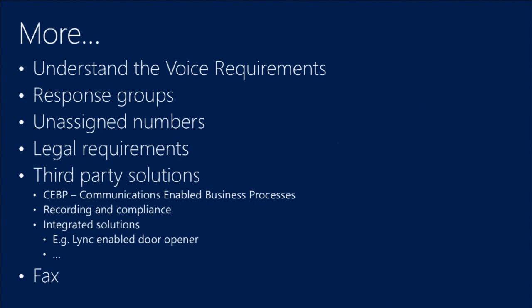Do they need response groups? What do we do about unassigned numbers? Are there any legal requirements? So far we spoke about emergency calling, but there might be legal requirements for compliance and for recording. Link, out of the box, doesn't do any recording of calls. Yes, you can do client-side recording, but depending on what vertical you're in and what country you're in, you might have to record all the calls with certain customers. There are a lot of third-party solutions, so I'm confident that every requirement can be met. Just make sure that you identify these requirements.